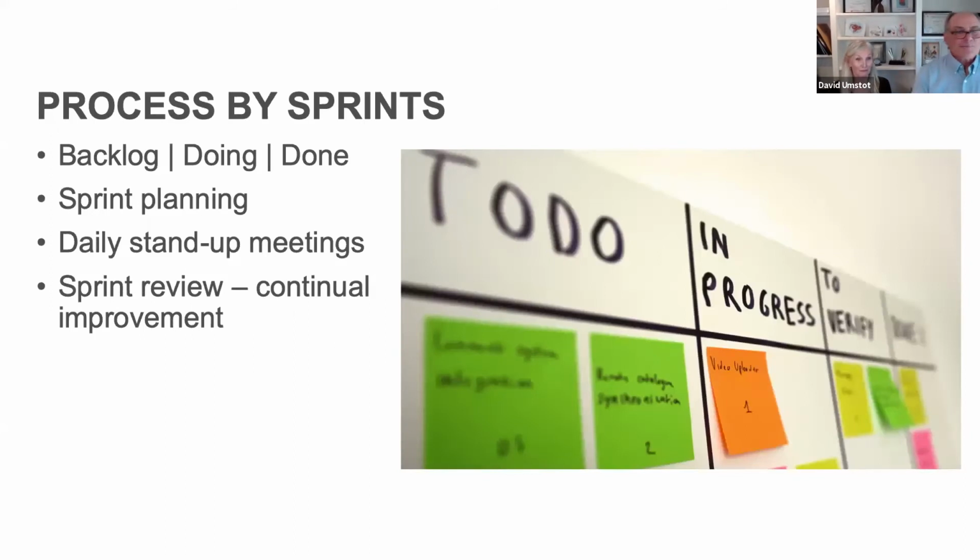Okay, so we talked about 6-week make work ready planning and lean and Last Planner 101, which is really 6-week, typically with boards, but people do it other ways. But essentially, it's some type of wall work that can be translated into digital format if you want. But in Scrum, you're using sprints, okay, which is essentially a board. It can be done in the same kind of context, whether it's a wall, whether it's a sheet of paper, whether it's a whiteboard, whether it's an electronic format, all of those work, okay?